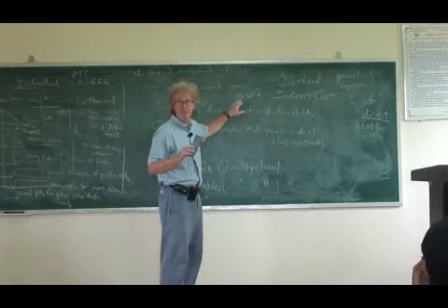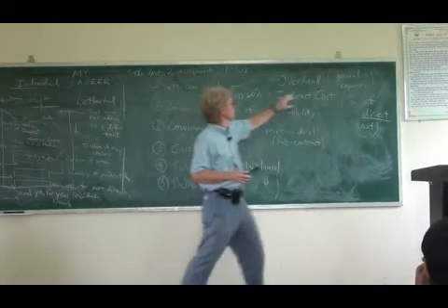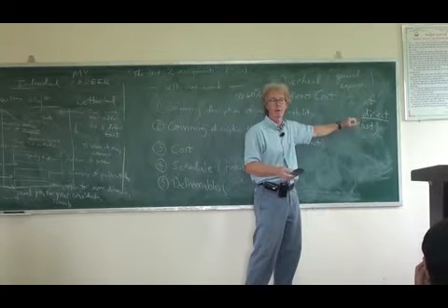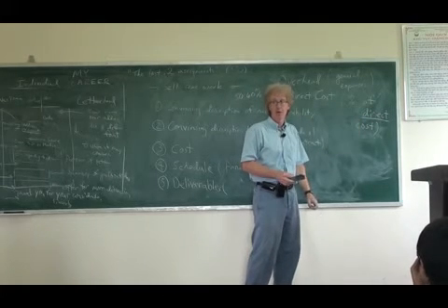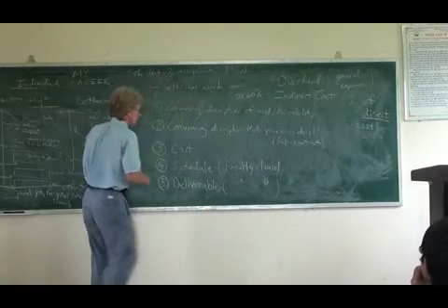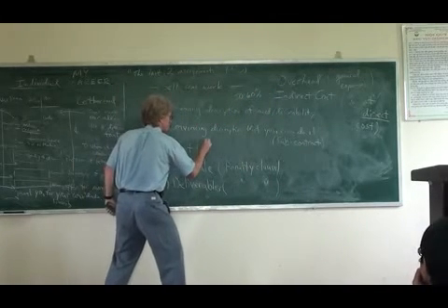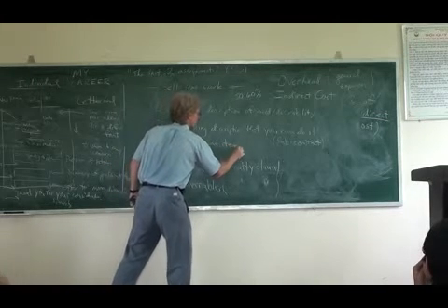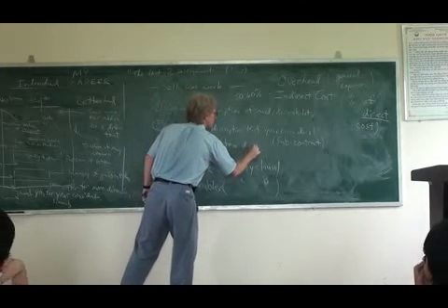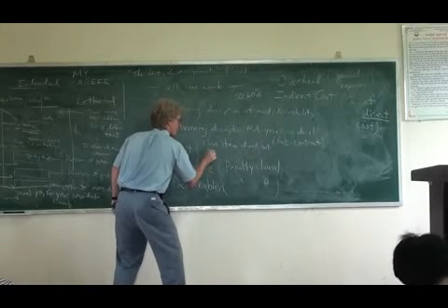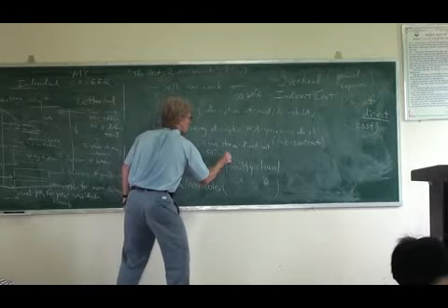50%, $500,000 would go towards these so-called indirect costs, and $1 million would go towards the direct costs. Okay? So when you submit a proposal to me, I want to see a line item budget. I'll say what that means in a minute. Line item direct cost, and put in 50% overhead.